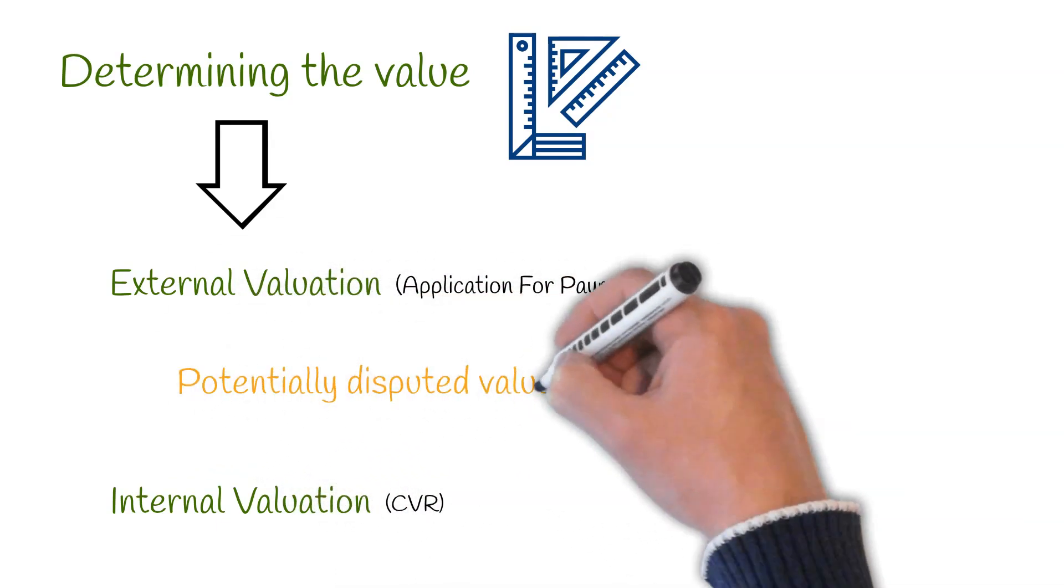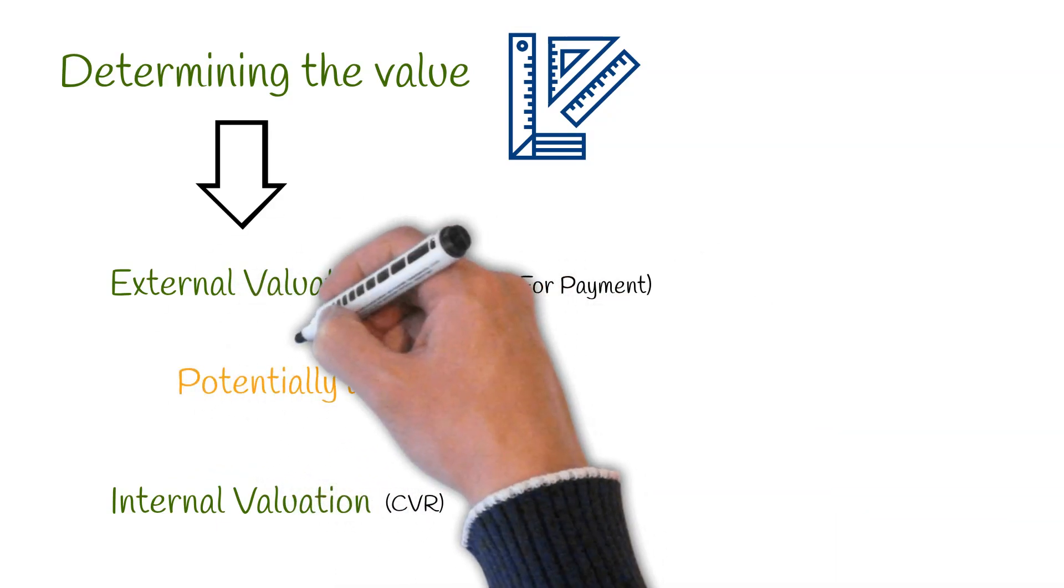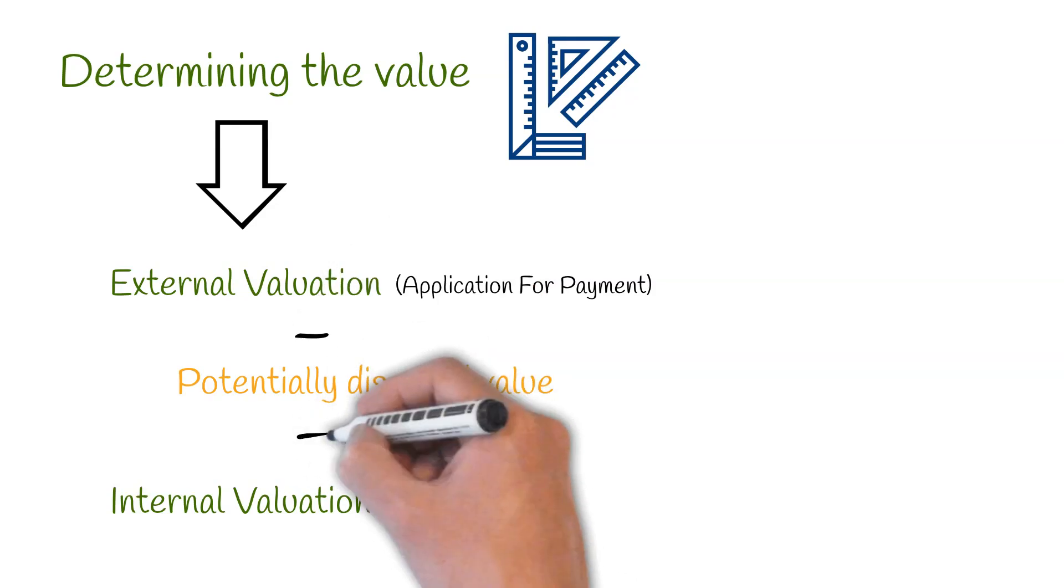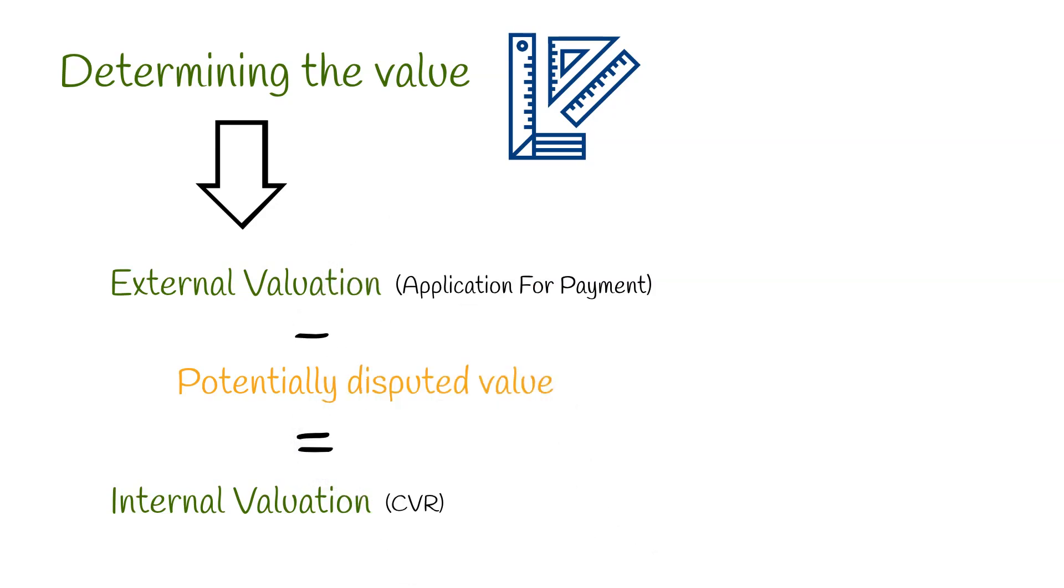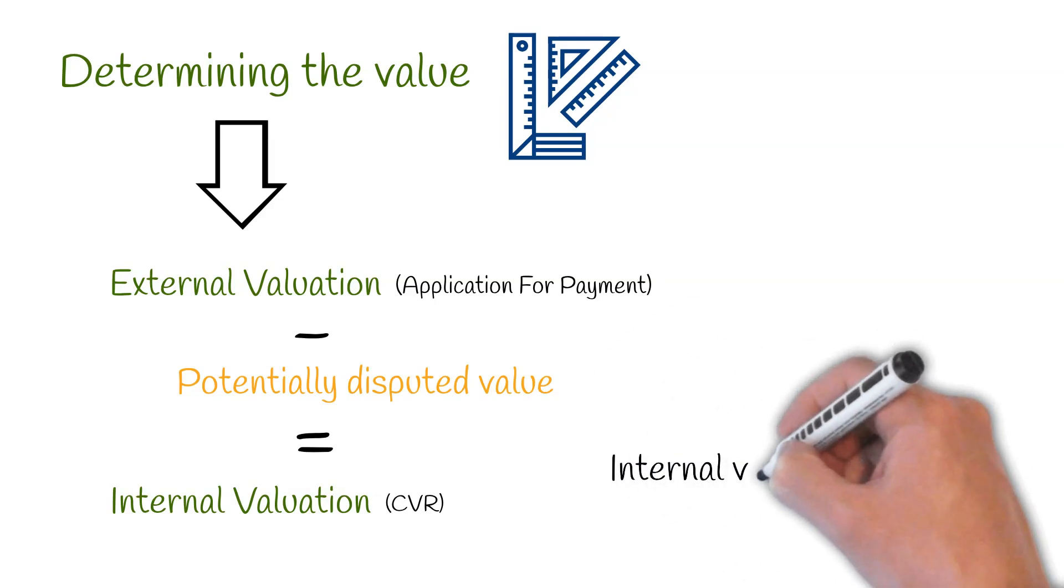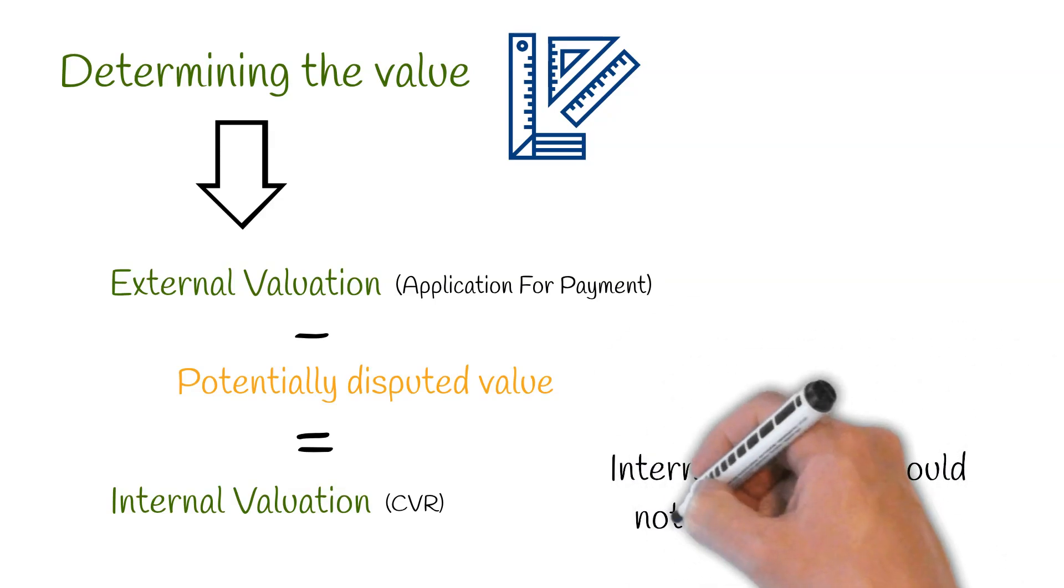This uncertain value is therefore not included within the internal valuation. This ensures the internal valuation which feeds into the CVR is not overestimated.